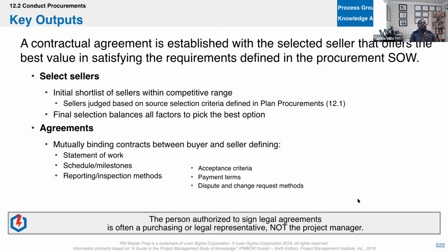Right? The project manager is not responsible for implementing risk responses, the risk owner is. And so make a note of that, either mentally or write that down, because that's one of the three. Okay. The second time the PM is not responsible is conflict resolution.